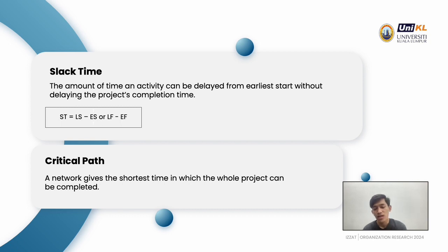So after we complete the previous task, they have to immediately move on to the next task. If they have a delay on the previous task, it will cause a delay to the whole project.